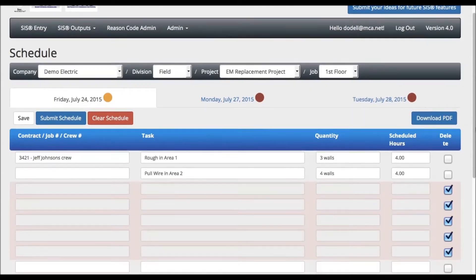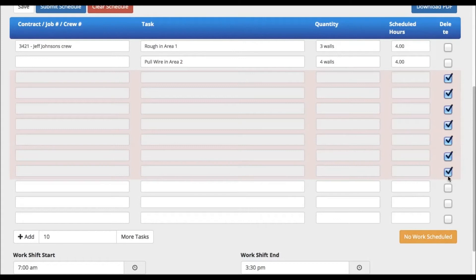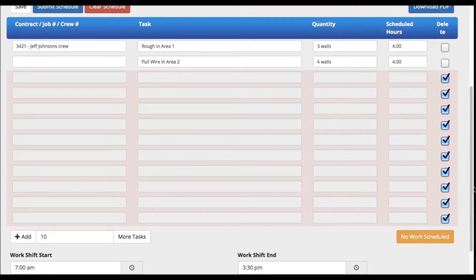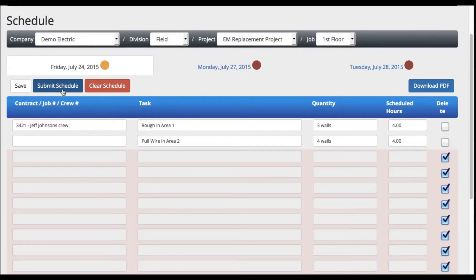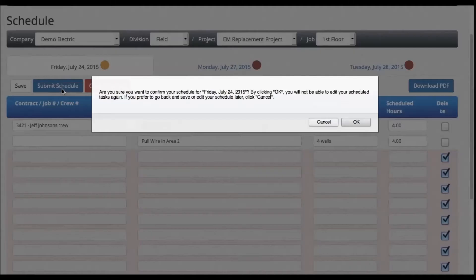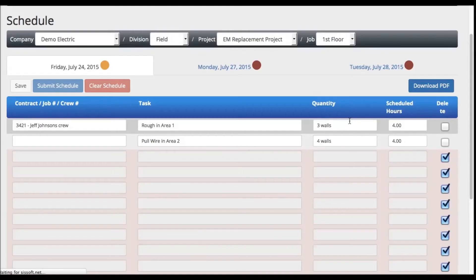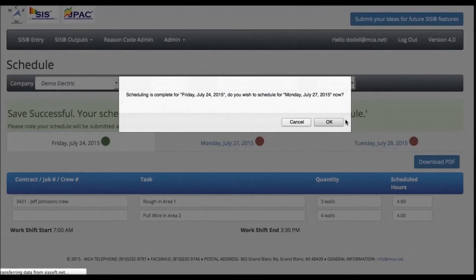When you have completed your schedule, press the Submit Schedule button in the upper left corner. A pop-up will appear asking you to confirm your schedule. Once it has been submitted, another pop-up will appear stating your schedule is complete for that day. By clicking OK, you will not be able to edit your scheduled tasks again. And you can now plan for Monday if you want, or just click the Cancel button if you prefer to wait.